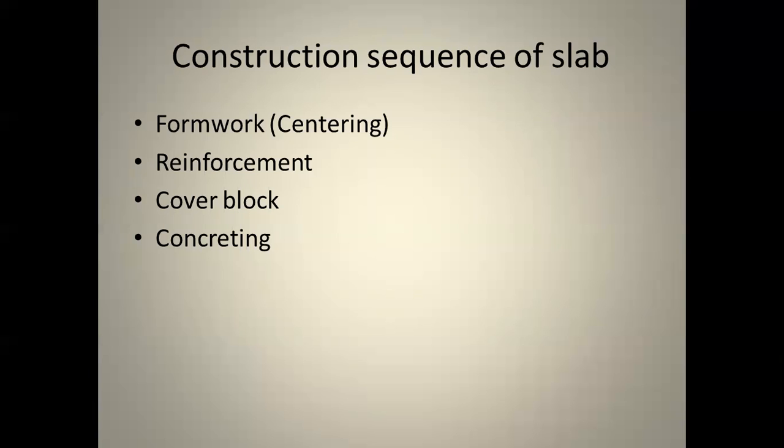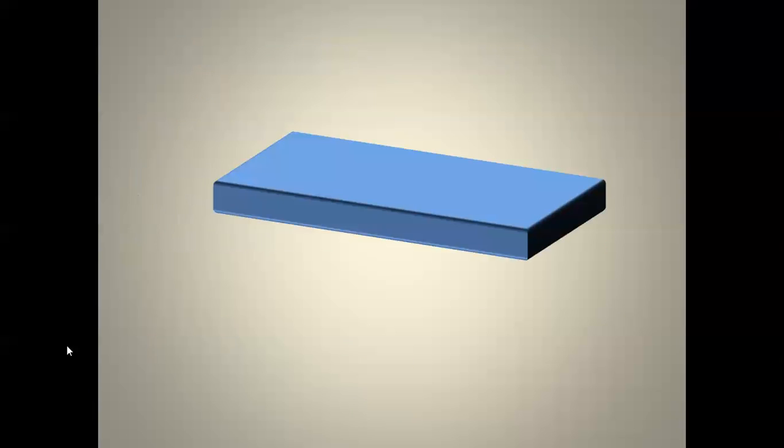The construction sequence is: first, arrange the formwork (centering); second, arrange the reinforcement bars; third, place the cover blocks and place the reinforcement bars above them; fourth, do the concreting.